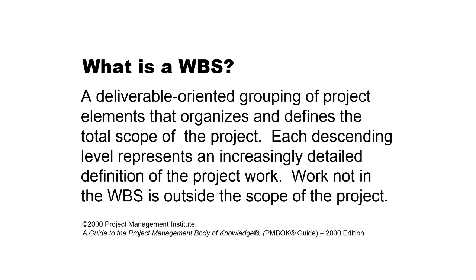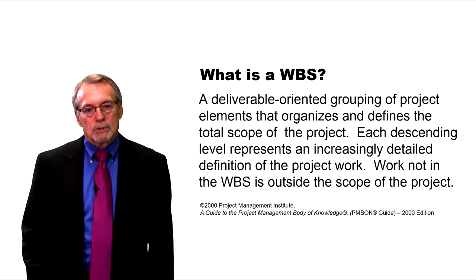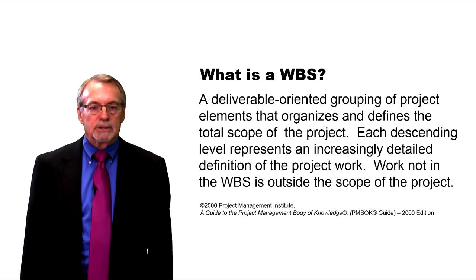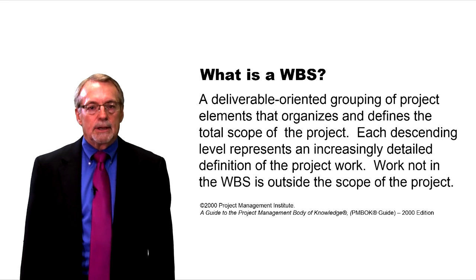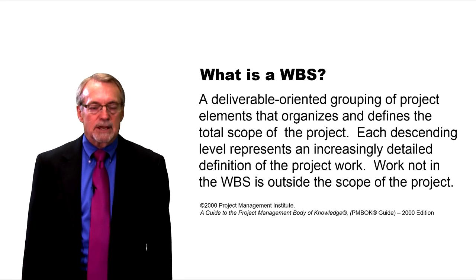Let's talk just a little bit about two schools of thought on the WBS. Some people say that the work breakdown structure should include the deliverables and a high level of work, but not all the details of work. The detailed tasks of the project, according to the Project Management Institute, would be listed either in a thing called a WBS dictionary and/or a separate task list. So the tasks would not be on the WBS.